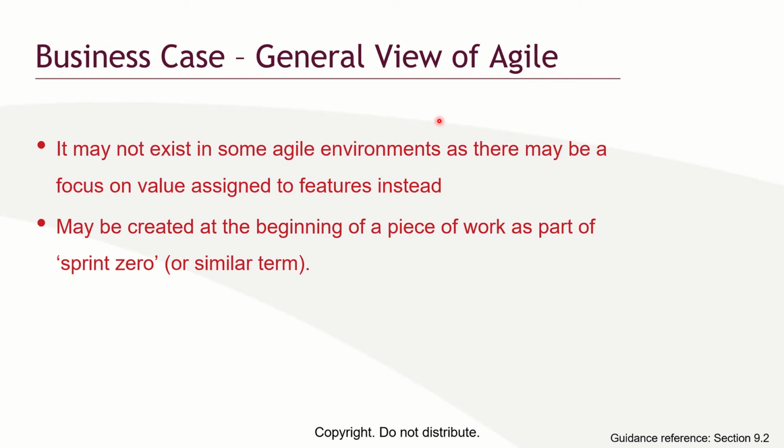That is, as at the time you are initiating a project, when you are starting up a project, you are supposed to have a business case, a justification. Why are we doing the project? What is the benefit? What do we lose if we don't do the project? So business case is a document, and there are different templates available for you to use to create a business case.